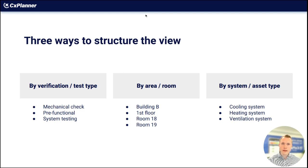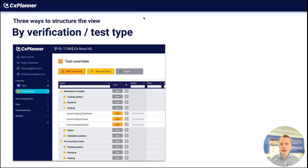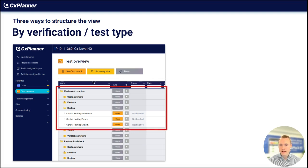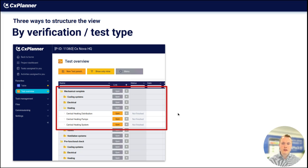In the next slides, we'll dive into each individual structure view. The first one is by verification test type. You can see a screenshot from CX Planner here from the test overview, where I have divided the assets into main verification areas. The red circle highlights mechanical complete at the top, with systems beneath it. I have expanded on mechanical complete and the heating system, where we have the central heating distribution, pumps, and systems. This is a good way to structure across the main test areas and then the systems or equipment beneath that.